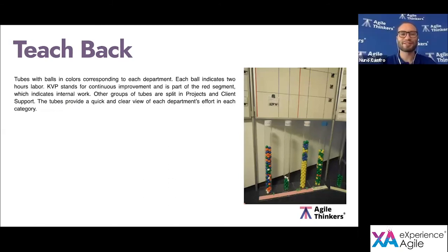Each ball represents 2 hours of effort. So basically, each team would know where they're wasting more effort. PVP means improvement things. All the rest are related to projects or clients, and it is a very visual way for teams to understand where